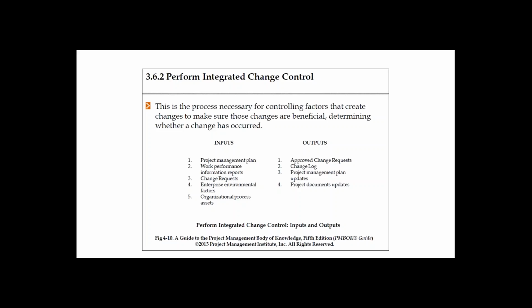It cannot always be a request from a stakeholder. It can also be defect fixing. Corrective actions are basically after the fact. So we are in the build phase, and then there are some defects, so you need to make a major change, and there will be an impact to the overall constraints. Again, that is a corrective action.